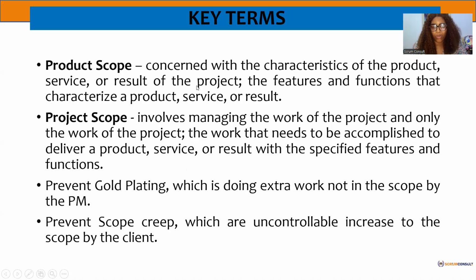So product scope concerns the characteristics of a product, service, or result of a project, the features, the solutions, the functions that characterize a product or a service or a result. Whereas the project scope involves, like we said, the short-term work that is involved in creating that product, the work that needs to be accomplished to deliver the product, the activities that we are going to do, and how we manage those activities, to prevent gold plating.